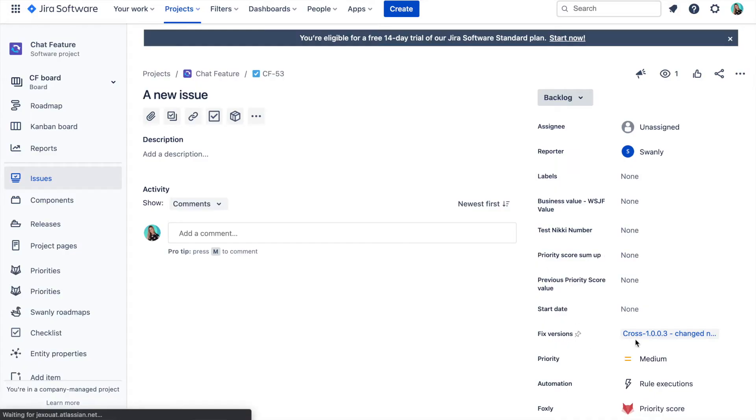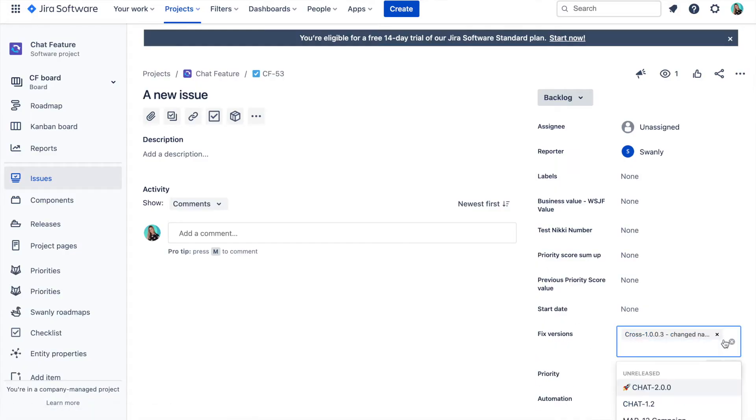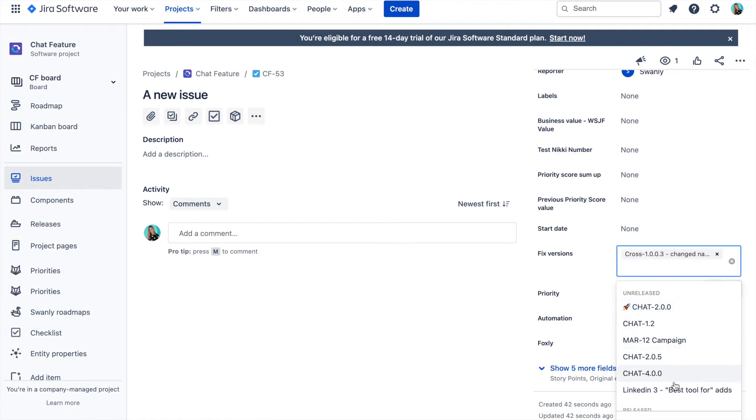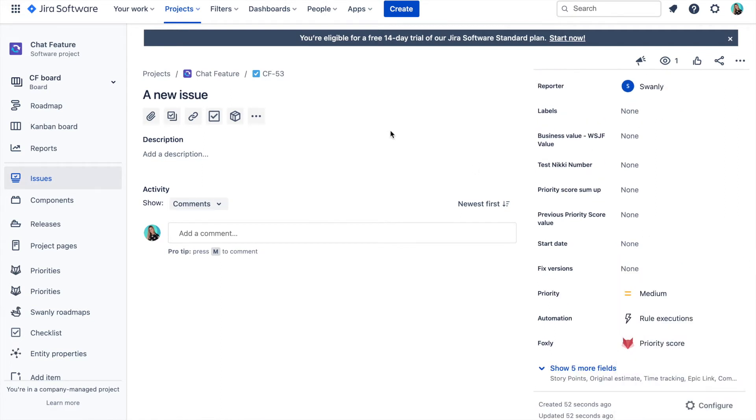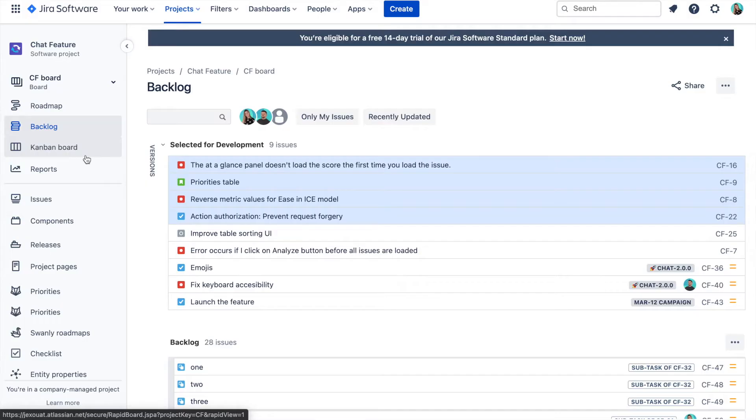If you would like to link issues to the version in Jira, you can do that from issue detail. There is this field called fixed versions where you can find a release and link it to the issue.